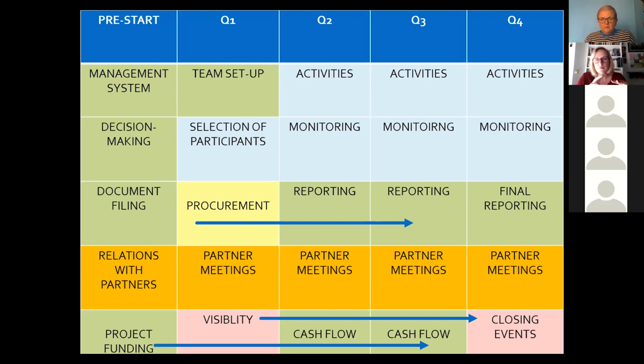Usually, our contracts for grants are already part of the tender documentation of the calls for proposals, and we can check that there. And we should know how to ensure and plan that cash flow. Very often, this is a huge problem for projects lasting more than 12 months, and especially for EU-funded projects. If we did not ensure the funds for the project implementation at the beginning, if we are not taking care of ensuring them immediately after the start and monitoring the cash flow, we might have certain problems at a certain moment of the project implementation.